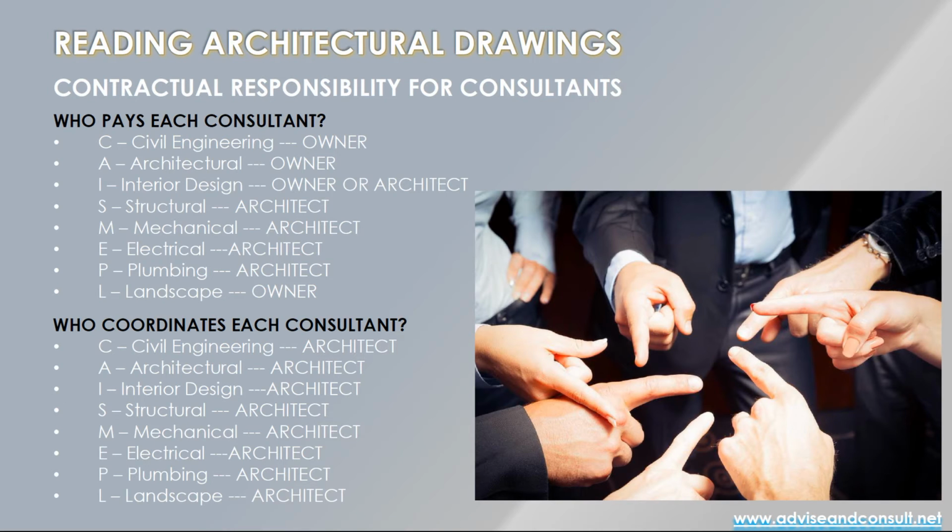The reason for that is that some of these consultants are directly contracted by the owner, some are contracted by the architect. You can see, for example, civil engineering is contracted by the owner, but structural is a sub-consultant of the architect. So the architect carries the liability for all of that structural, mechanical, electrical, and plumbing.